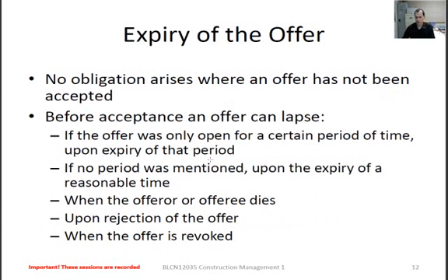Alright, the expiry of the offer. We spoke about this briefly right at the beginning. When do we see these offers expiring? Typically, if there's a date on it. You'll see this many times if you start collecting information working on a big project. Your contractors or suppliers might say, this quotation is only valid for 30 days or 60 days or 120 days. Working with the government, of course, there's a few extensions to that rule. So always make sure that you understand that certain period of time for that specific contract.